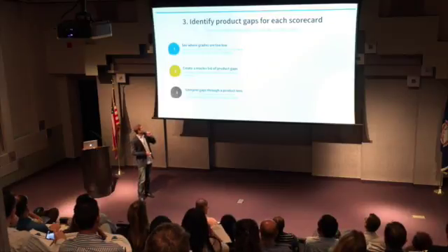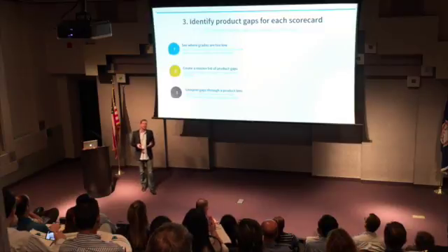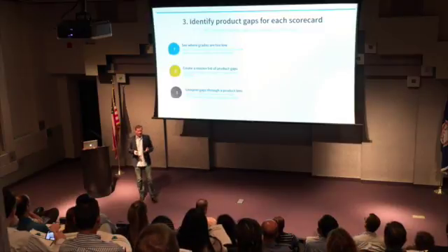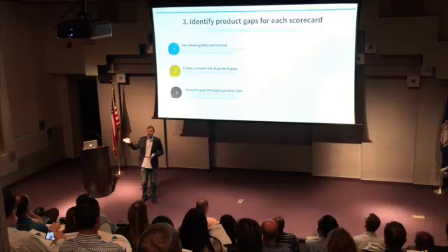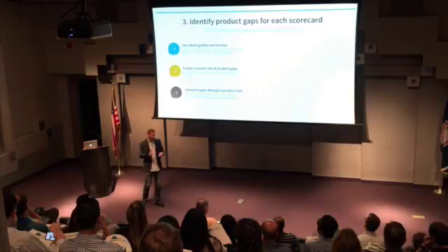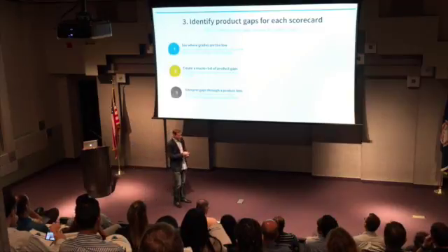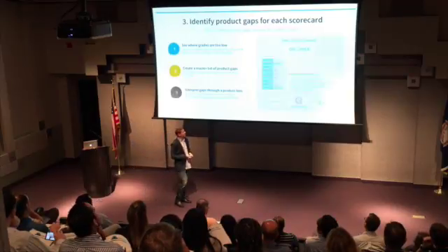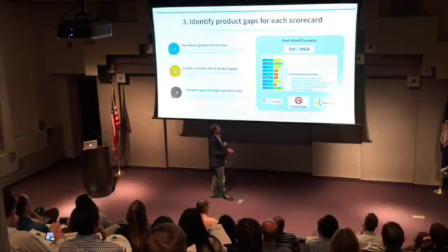So we see their grades are too low. We create a master list of the product gaps. And then there's also some consolidation that can happen as well, right? So the product manager might say, hey, there's actually 3 different organizations, each that define the exact same gap in the product. Well, I don't need to build it 3 times over. It's the same problem. Let's go solve that one time and solve 3 different stakeholders' needs simultaneously, right? So this consolidation and massaging of the gaps as well involves a little bit of interpretation. Here's a great example of that that comes from OPAP.